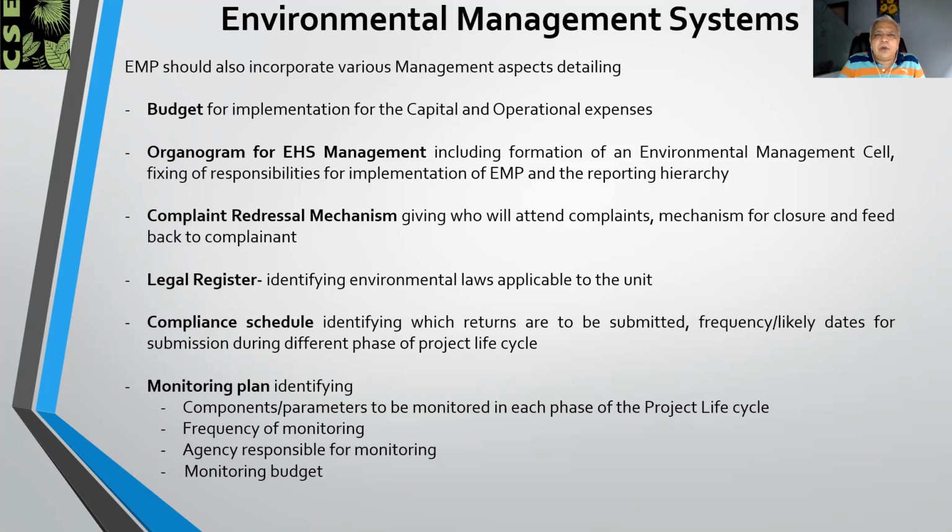Now, the monitoring plan should include the frequency of monitoring, the parameters of monitoring, the agency responsible for monitoring, and the monitoring budget, so as to make it very clear. And one suggestion which I have is that instead of making the EMP into a very large written document, we should try to make the EMP based on a tabular format, so that it is very simple for everyone to understand.